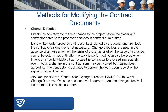That CCD must be within the scope of the original contract. You can't have a contract for painting an office and then issue a CCD that says to add a three-story, 10,000-square-foot addition. That would be outside the scope and gets into cardinal change, which we talked about last time.